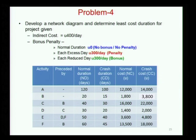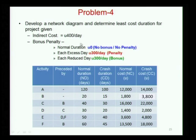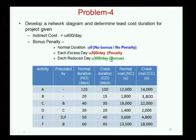So if we take the problem given here, we have a precedence relationship with activity, predecessor, normal duration, and crash duration — all the usual information. In addition, I have given an indirect cost of 400. The addition now is: if the project finishes with normal duration there is no bonus or penalty; for each excess day there is a 300 per day penalty, and for each reduced day there is a 300 per day bonus. Can you set up this network and start working on it? We will solve it.